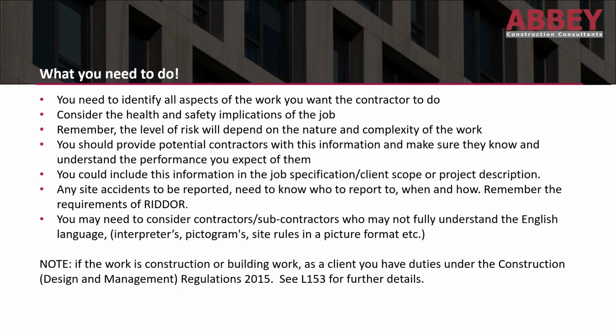You should provide potential contractors with all of the above information that I've just discussed, and make sure that they know and understand the performance you expect of them. So as part of your site rules, you might say not permitted in this area, no bad language is permitted, no food to be eaten in these areas. So you would provide them with all of that information. You would also provide them with a job specification and the client scope of the project. This is what the client wants, this is what he wants it to look like, this is when he wants it, etc., etc.